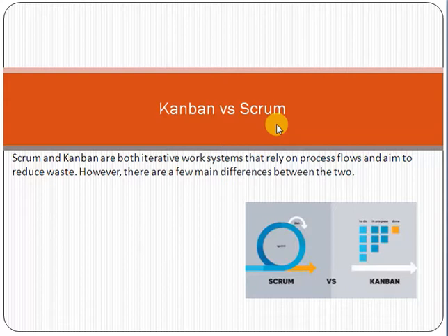Now with the Scrum framework, Scrum is a methodology which we use for managing software projects. In Scrum we use the iterative approach. The iterative approach means that we divide the work into multiple chunks which we call sprints. A sprint is a 3 to 4 week time period, and with the iterative approach we deliver the project to the customer. So remember that Scrum means we divide the work into multiple chunks and deliver it to the customer with multiple sprints. So this is the main concept of Scrum.